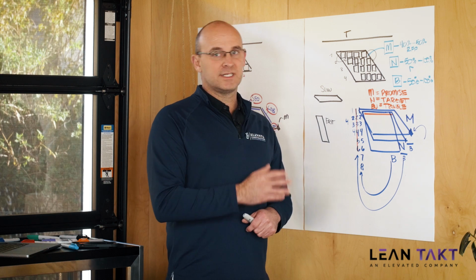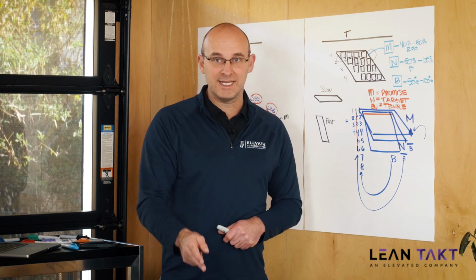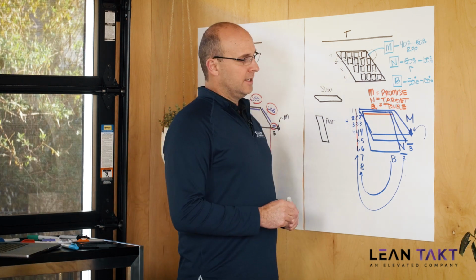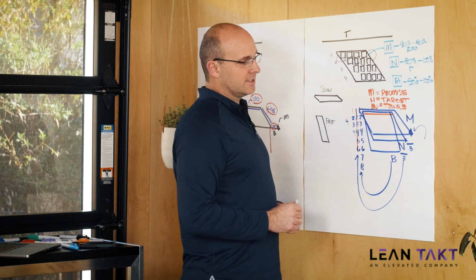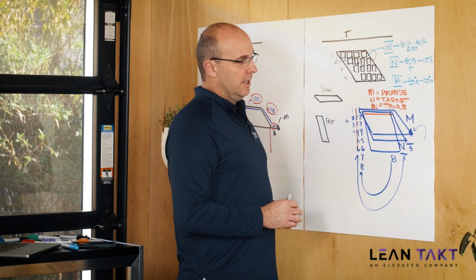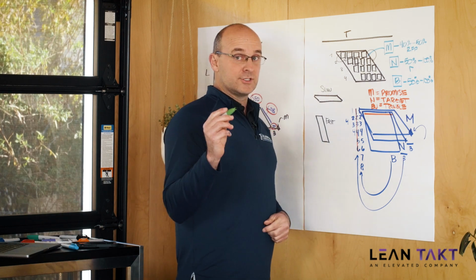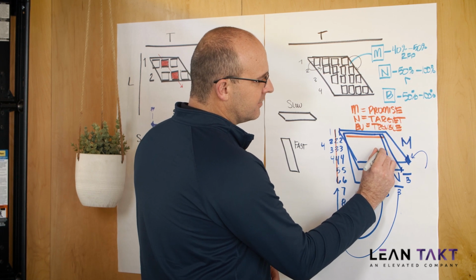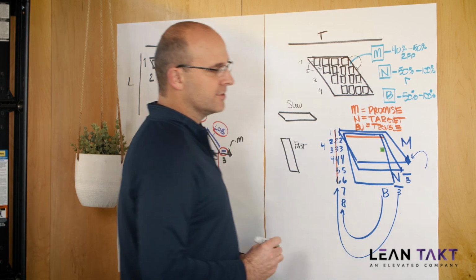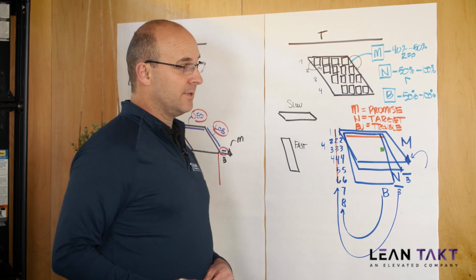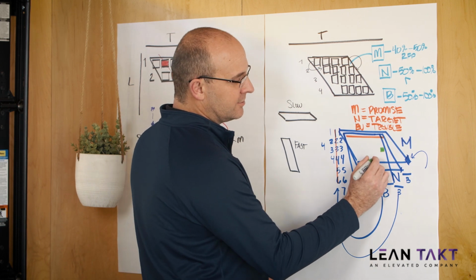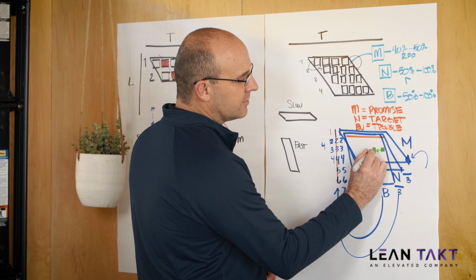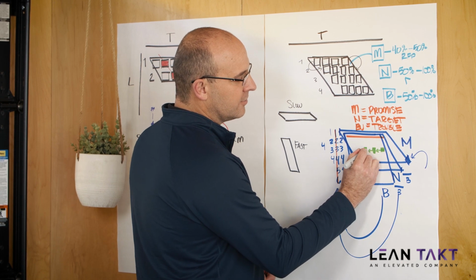This is not three separate schedules. It's the same schedule, different speeds, which your owner wants to do anyway. So I just want you to know that when we're looking at this, these are the same schedule going at different speeds. And again, like I said, this is key. Let's say that you have a material as a part of your macro level sequence. Let's say that there's a takt wagon here that I'll mark as green, and you said that's my date. Well, when you optimize down to your norm, that activity is going to move closer, and if you do a backup, it's going to move closer still.